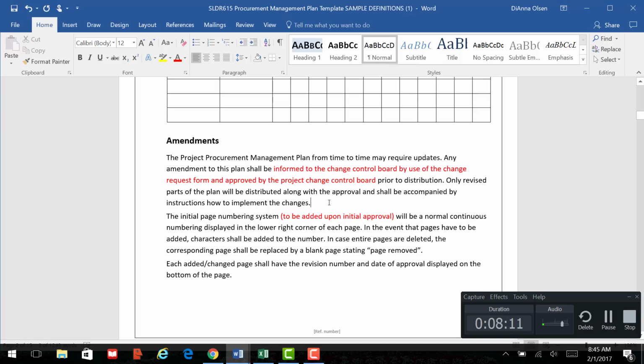So I might be telling my subcontractors that, look, here's the instructions of how I want you to bid out this work. Once we've approved it, here's exactly what I want from you in terms of a proposal and a quote. And then I will not approve any additional change orders unless I have them in writing, signed by both you and by me. So you are making the rules.